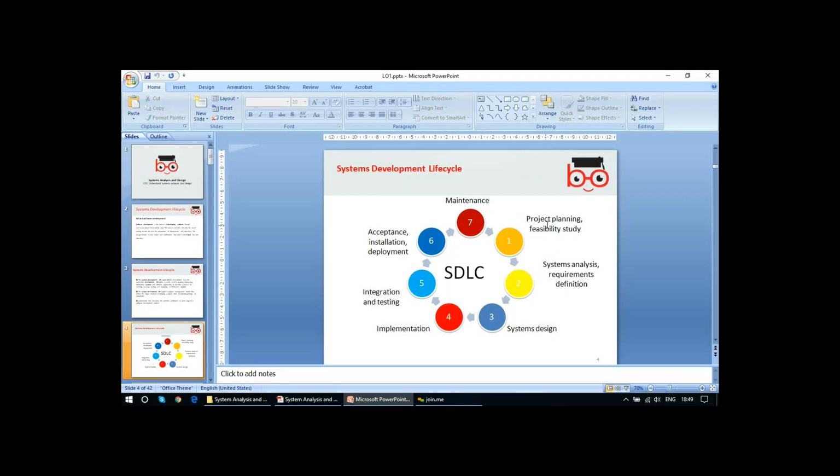Because the words are self-explanatory, you have a plan, but is it feasible? How would you check the feasibility? Obviously, you would check the feasibility based on the number of people, the funds available to you, and the time duration. So the plan is feasible. It's a nice project. Do you have funds? Do you have people to do it? Do you have time? If you don't have the time, even if you have money and people, then it's not feasible.